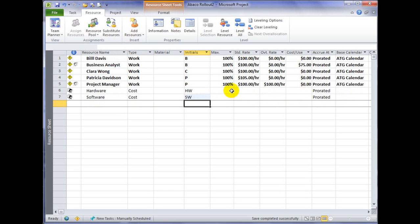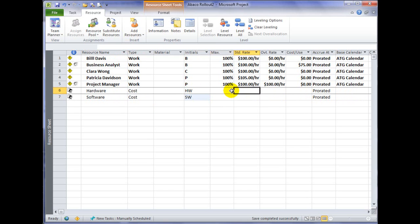But the other fields such as maximum availability, standard rate, overtime rate, cost per use, none of those are relevant.